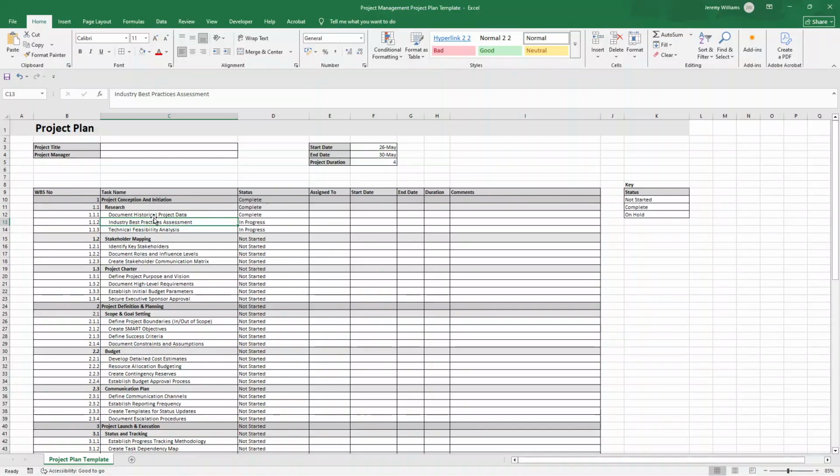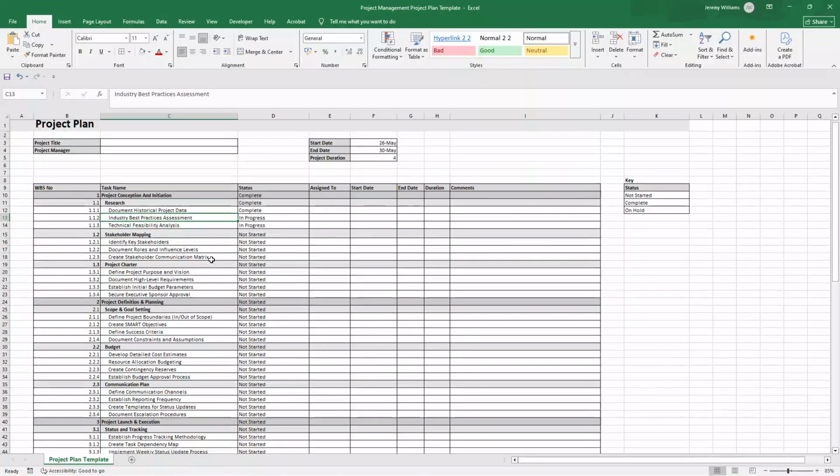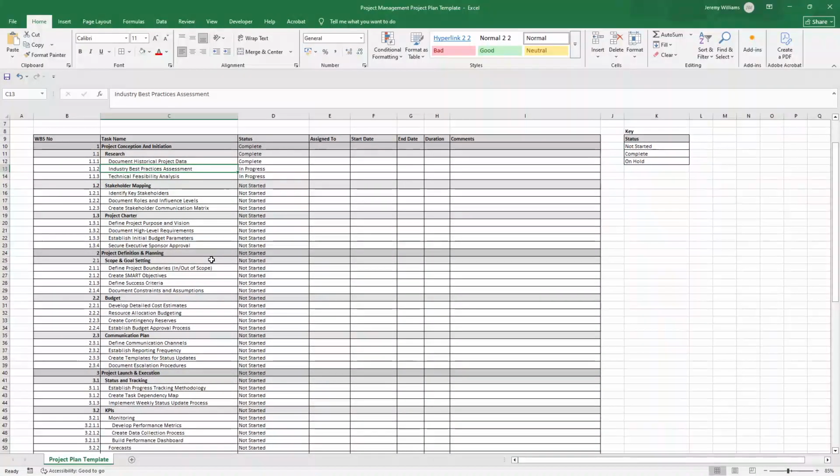One important reminder: never start with a kickoff meeting as step 1. So that's a little bit of an expert tip there. Notice how much preparation we've done before we even get to that point. Okay. When you do hold your kickoff, don't just tell the team there's a project. You need to show them that you've vetted everything with their managers, present your complete plan, and make it clear they'll begin execution immediately after.